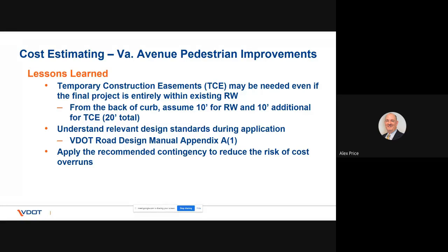Ironically, the contractor that had the lowest bid with the first advertisement actually had a project over in Carroll County that he was bidding on at the same time. So this would have been work that he would have tried to do, again, as filler work. But his prices were out of line and out of the realm of our budget. So hopefully, as Eli mentioned, we've got several contractors that are looking into this project now that we've added the special provision, and we hope to see a successful outcome here in the next bid letting.